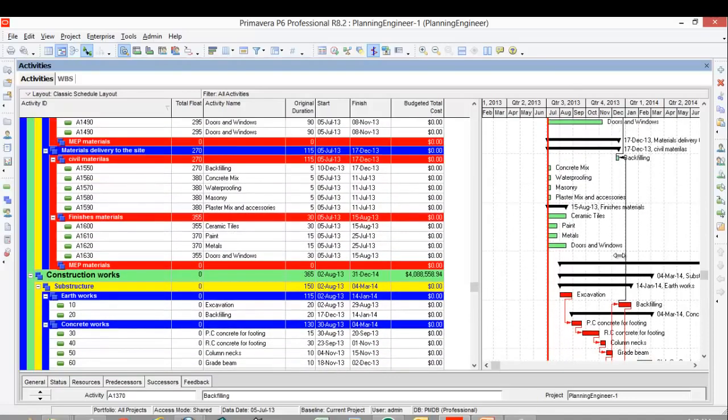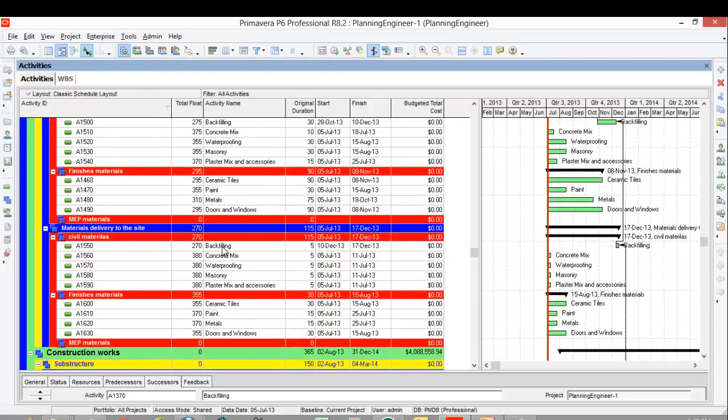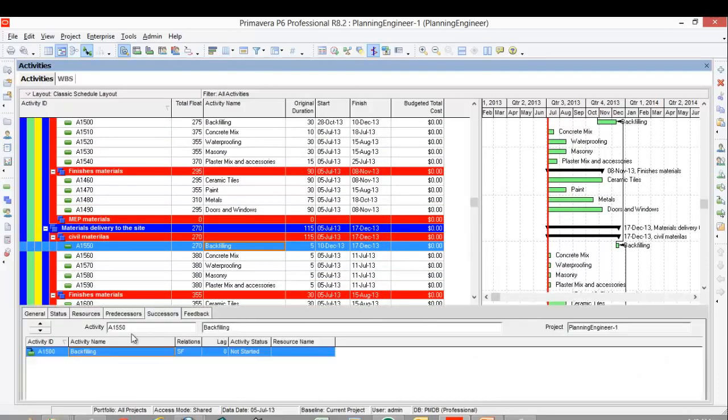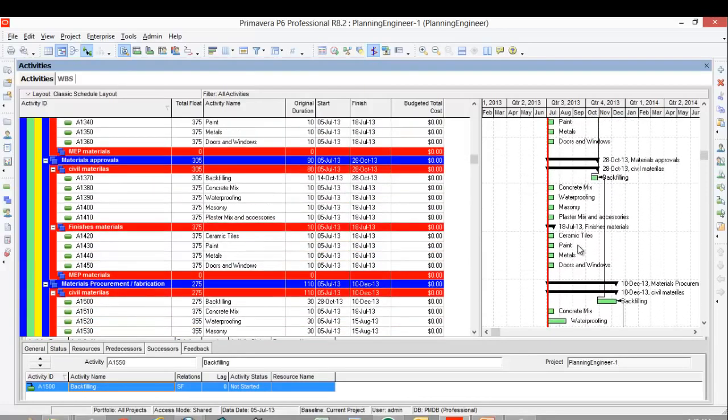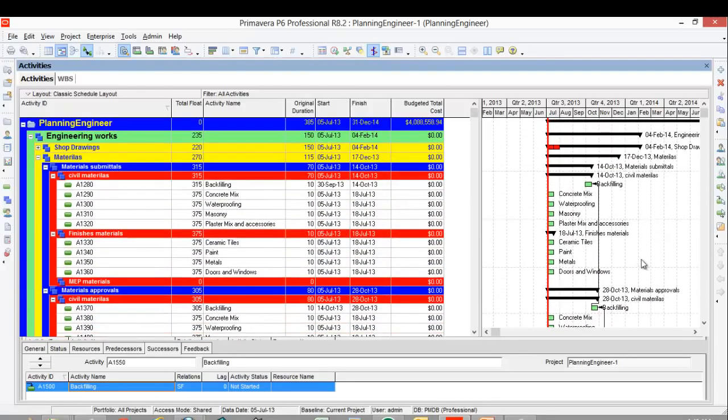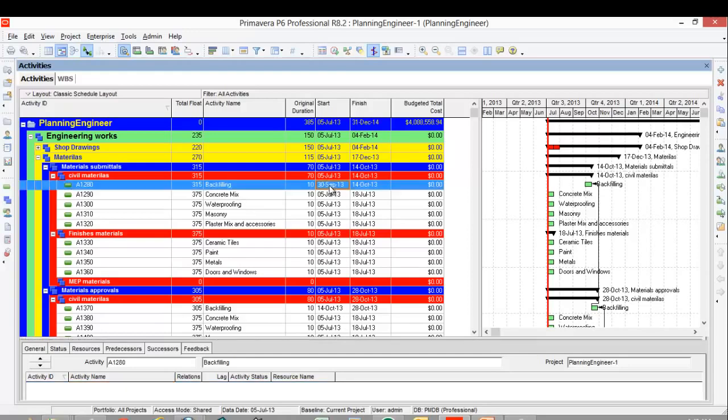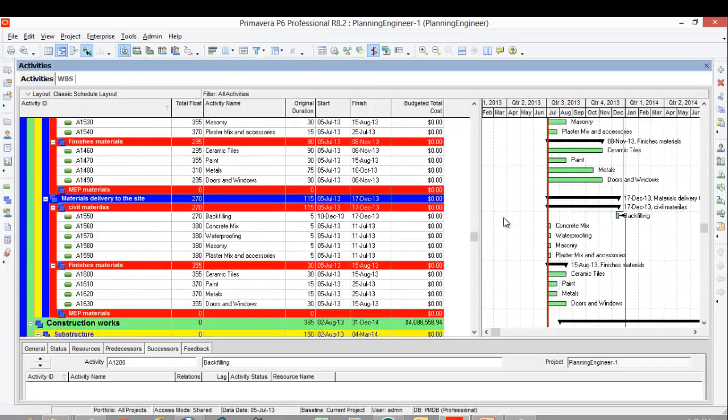work execution. Actually, this start to finish relationship sometimes is not preferred by the consultant or the client. But anyway, I'm doing it like this. Then if the client has some comment about the relationship, I already know the start date, so I fix this start date and go backward, finish to start instead of start to finish. But for now, we will make it start to finish.